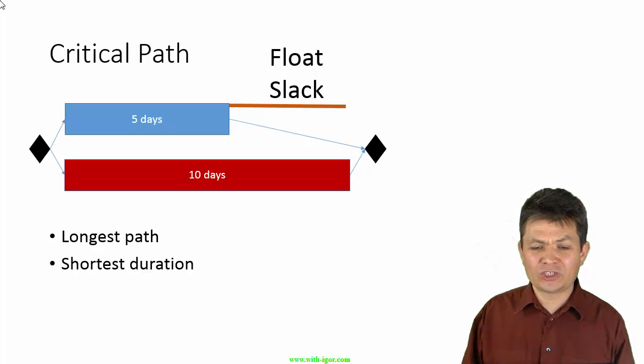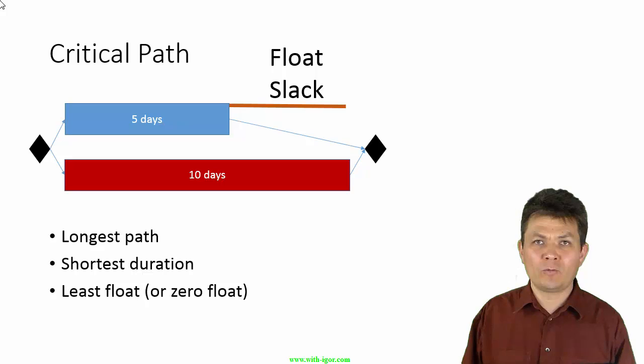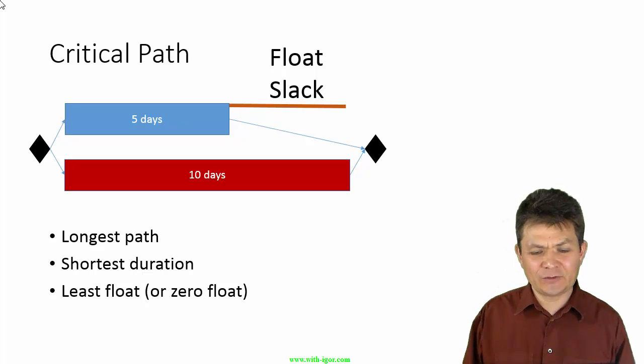And there is no slack on the 10-day task. So, the critical path is the longest path, the shortest duration of the project, and it is also the path with the zero float or smallest float or slack, least float or zero float.